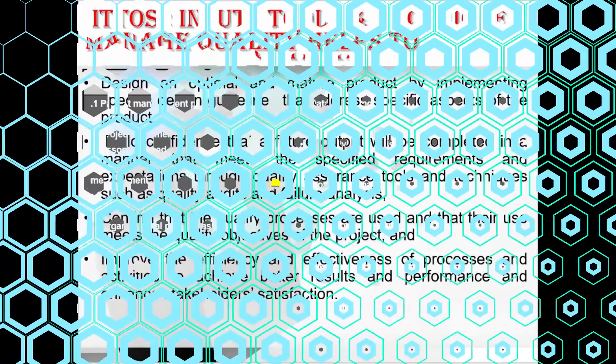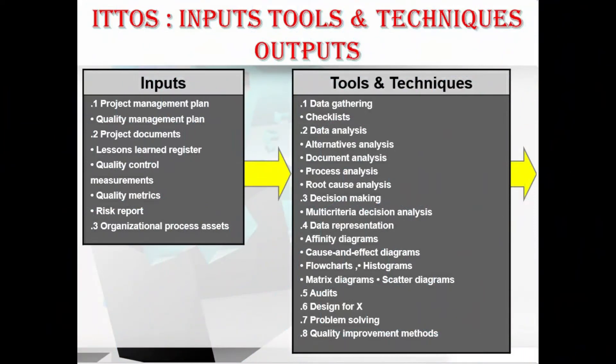Let's move to the ITTOs in more detail — inputs, tools and techniques, and outputs. In inputs, we have the project management plan, which consists of the quality management plan, and project documents which contain the lessons learned register, quality control measurements, quality metrics, and the risk report.